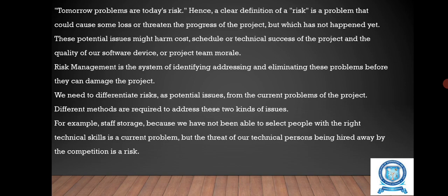Risk management is a system of identifying, addressing, and eliminating these problems before they can damage the project. We need to differentiate risks as potential issues from the current problems of the project. Different methods are required to address these two kinds of issues. For example, the staff shortage, because we have not been able to select people with the right technical skills, is a current problem, but the threat of our technical persons being hired away by the competition is a risk.